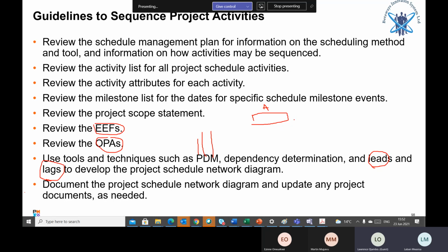You can build a 1 day lag for the paint to dry before you move into the building. That's a mandatory lag, okay? It's not a preference. That is a lag in between painting and moving into the building, because the paint is wet and you cannot move in.